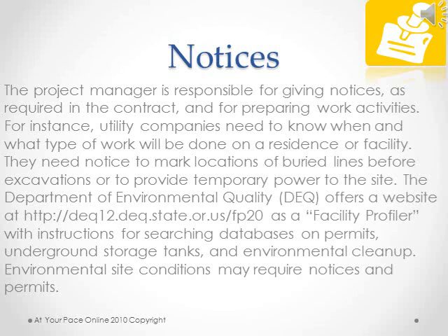Notices. The project manager is responsible for giving all notices, as required in the contract, and for preparing work activities. For instance, utility companies need to know when and what type of work will be done on a residence or facility. They need notice to mark locations of buried lines before excavations or to provide temporary power to the site.